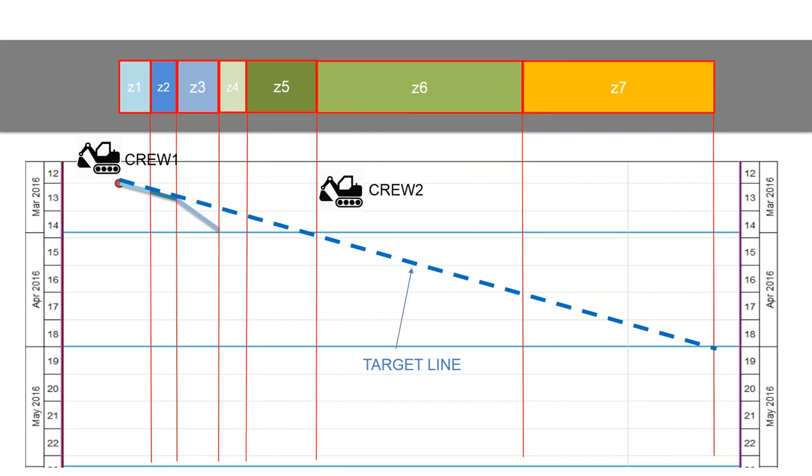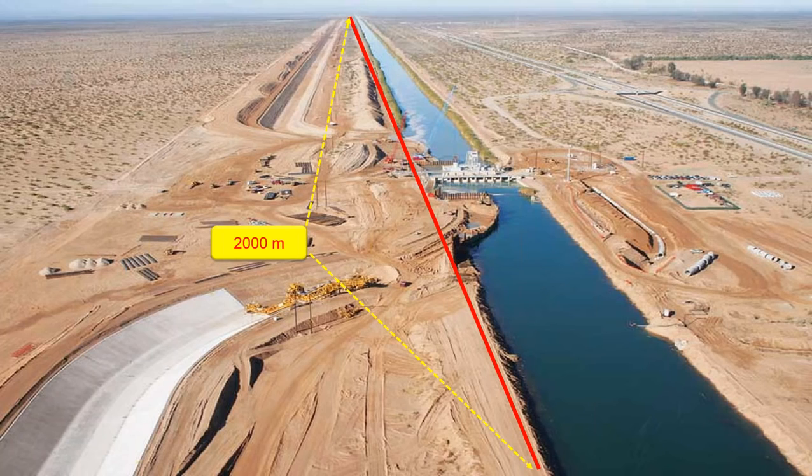So we decided to put in a second crew and start it here. At the same time, crew 1 is continuing, and this way we can avoid delays. But as I mentioned, a second crew means extra money, and this is the area which is 21 days. Just by assigning the second crew, we avoid project delay for the time matter, but we increase our cost because we have an extra resource which we are using. And in the end, as you see, we have achieved our channel and the water in the channel, so this is how we approach and manage projects.